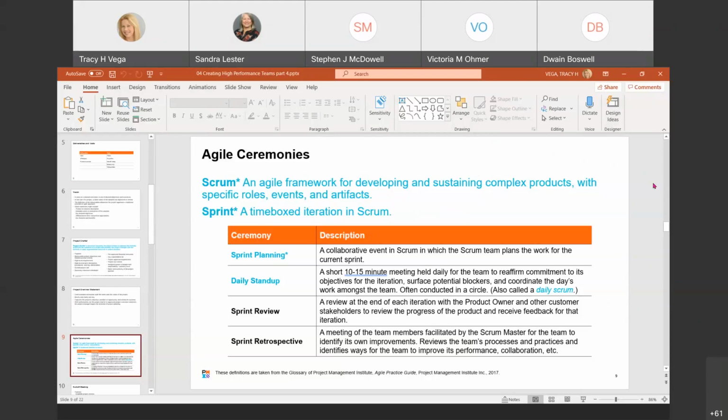So the sprint planning meeting facilitates agreements on small goals for the team to complete during a short defined period of time, generally referenced as a sprint or an iteration in this case. A sprint is a time box between 1 to 4 weeks to facilitate planning and improve the quality of estimation, and set a consistent cadence for the team and the product owner.